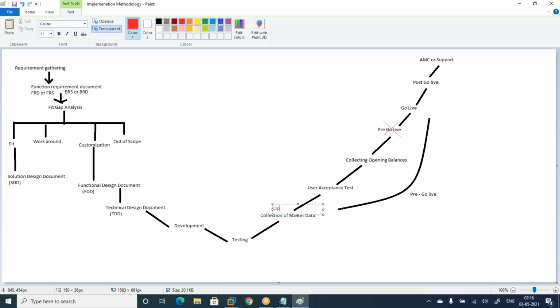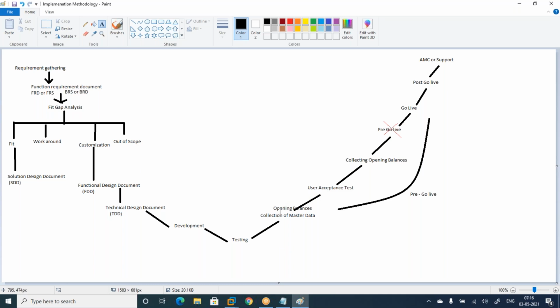In this also, opening balances, but that will not be perfect opening balances. Of course, for practicing purpose, we may collect these opening balances in the initial time. Later on, once again, we need to collect the opening balances on 30th June, because go live date is 1st of July. This is for practicing purpose or for verification purpose. Definitely we can proceed. But once again, we need to collect actual opening balances before go live date. Agree with me, Kumar?